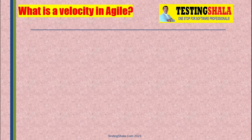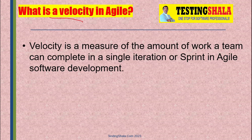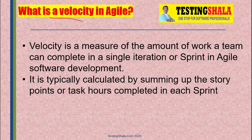In this video we'll learn about what is velocity in Agile. Velocity is a measure of the amount of work that a scrum team can complete in a single iteration or sprint. It is a key parameter, and velocity is calculated based on summing the total user story points.